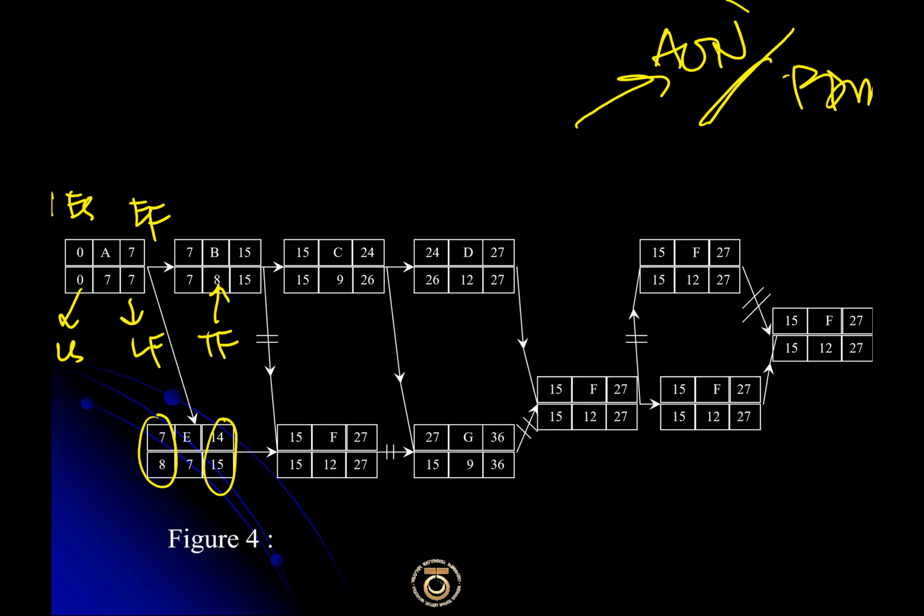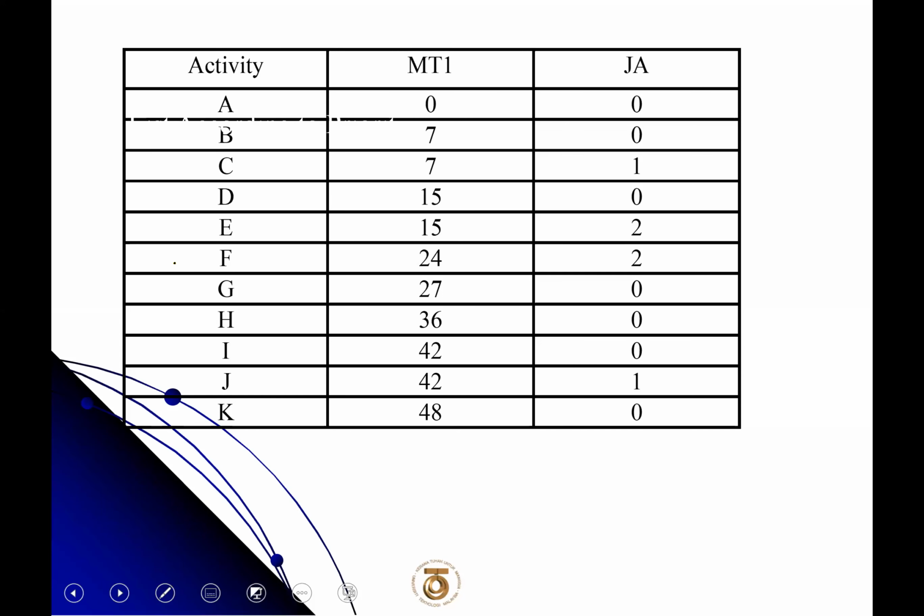So in this case, total float is 1. This is not total float, this is just the duration. So the total float value we can calculate. And the one which I indicate here is the critical path. The critical path is here. All right, so we complete the network diagram with all kinds of calculation. If you do this in Microsoft Project, you can easily get all the values without any hassle. And then, what is this thing? Sorry, this is in Malay.